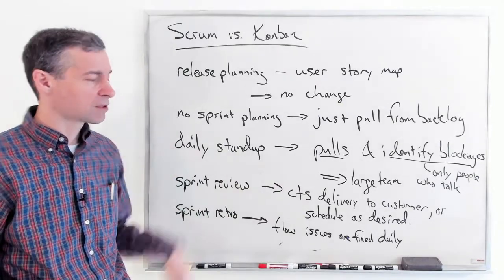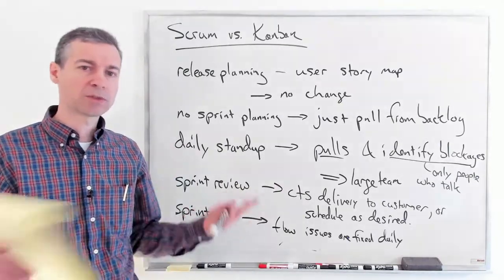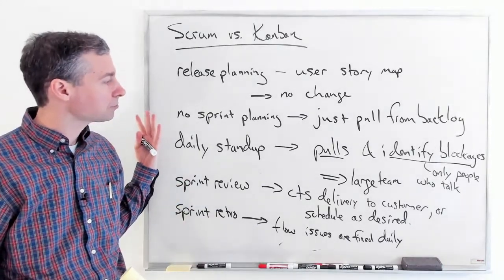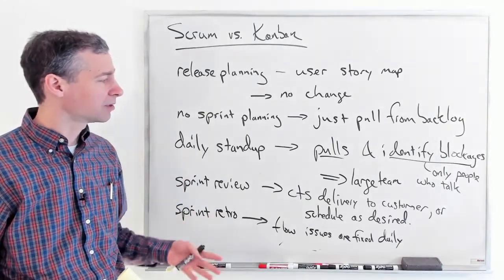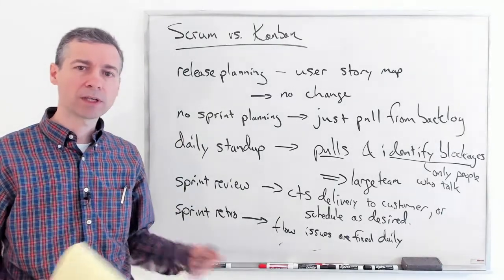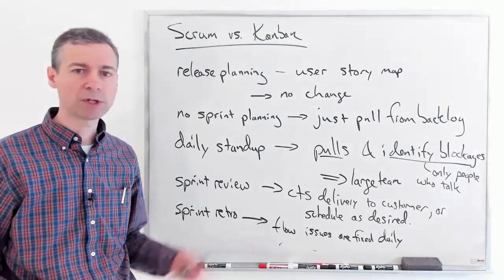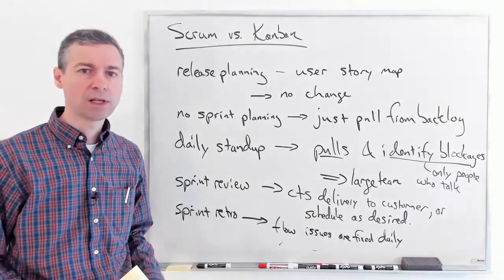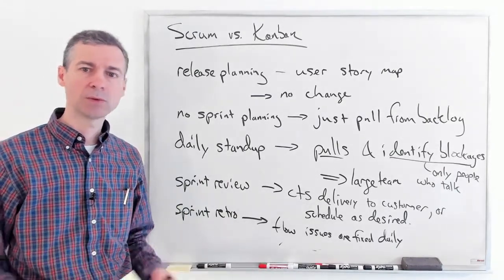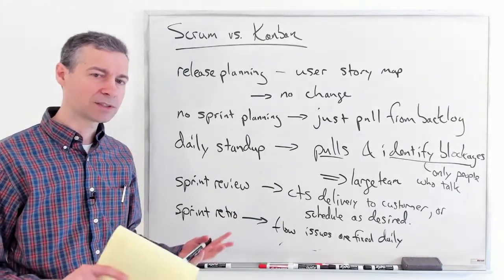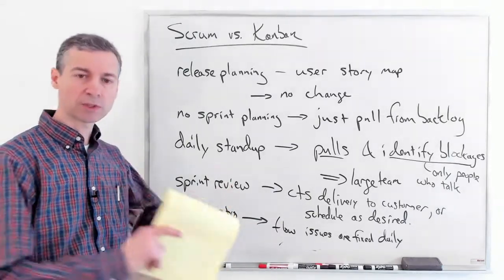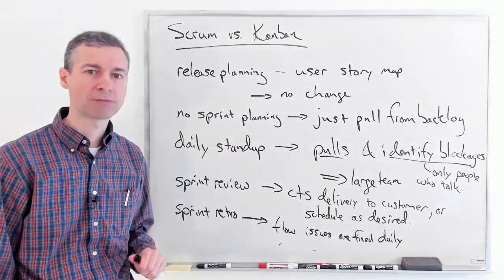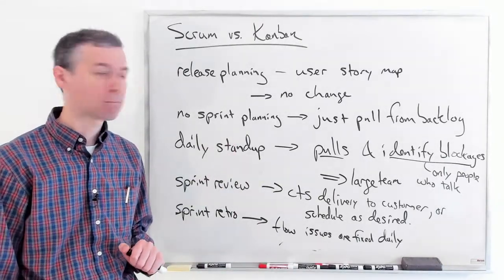Those are the key differences. The big thing is sprints are gone — it's continuous flow. But a lot of the XP practices like pair programming can still be done. We're still going to have all sorts of testing and code reviews. We're still going to use stories, specify them, and turn them into tasks. A lot of it is the same.